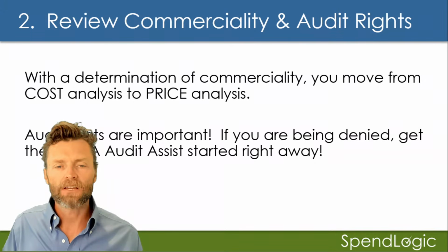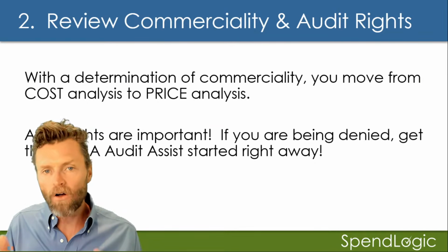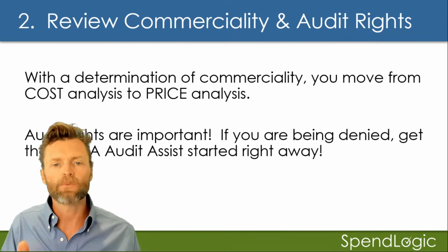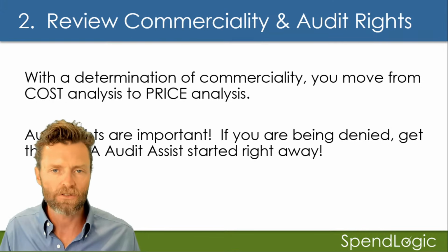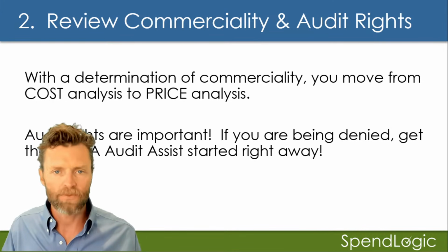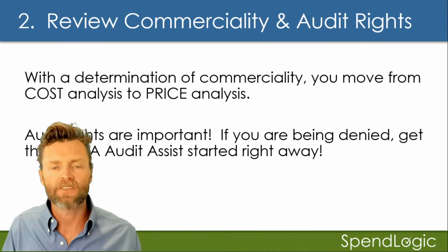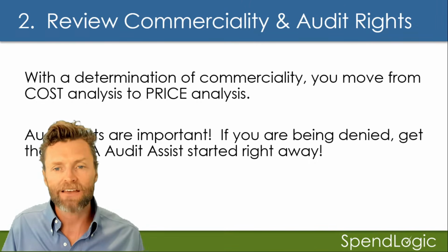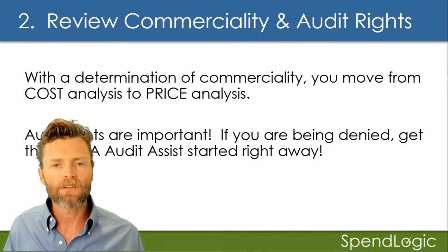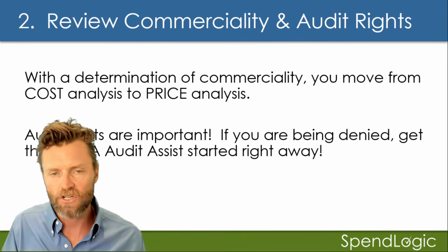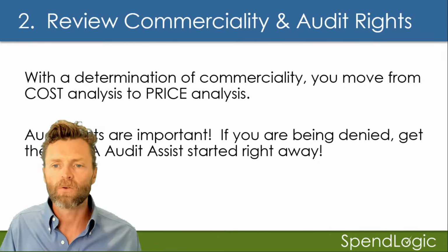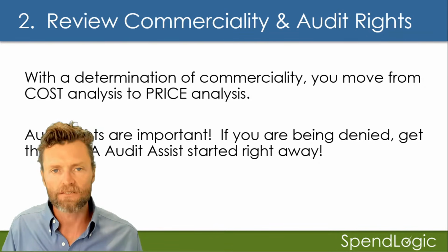So the first step that we always do is we take a step back, we look at it and we say, okay, is there any way that we could determine this to be commercial? Is this of a type that's used by the general public? Can we make the case for that and make a strong case? So again, go down that path first, okay? If you've come to the conclusion, which in this case we've concluded, that we can't go down the commerciality path, the next thing that we want to look at is audit rights, okay?